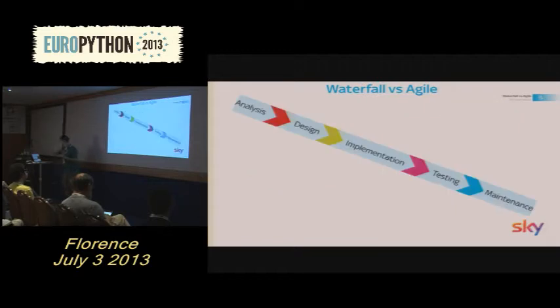Looking back now to the waterfall methodology. Some of you may be familiar with this. In a typical waterfall project, you're going to first start on the analysis. This is where we gather our requirements. Let's say this will take perhaps 1 month. Then only once we've got our requirements, we can start on the design. We start designing our system, perhaps wireframes. Let's estimate this another month.